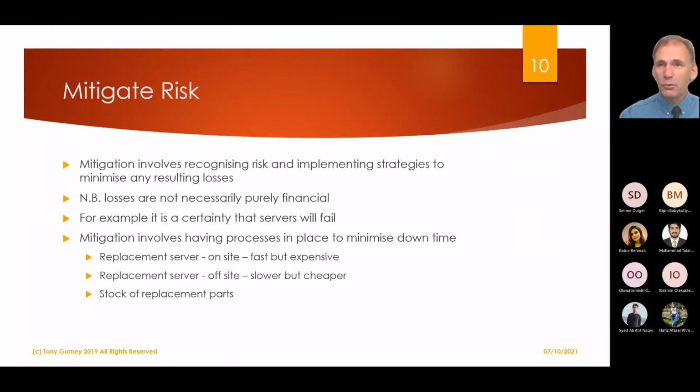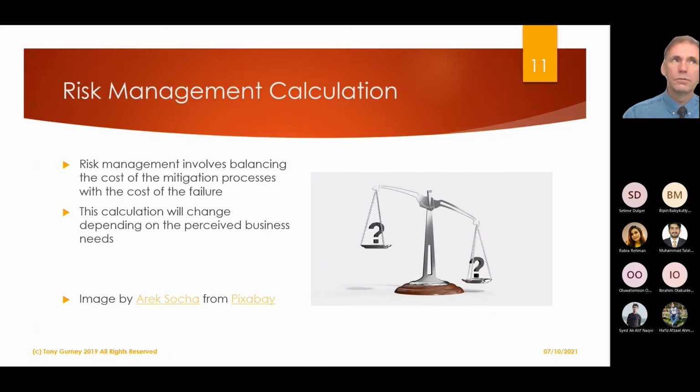So how you approach it is entirely down to the organisation. It's to do with the funding, it's to do with what might happen. You make a calculation. You figure out how much it costs to mitigate against the cost of what could possibly happen. So for BT, it's worth it to replicate a multi-million-pound computer system and all the data centre and the staff and all the rest of it. Because if it goes down even for a second, it will lose a fortune.